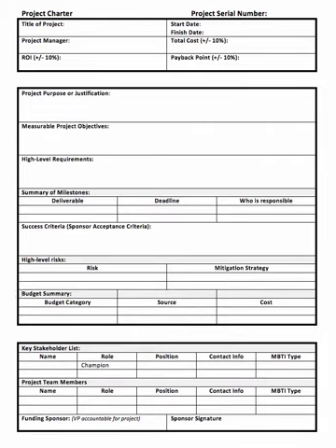In other words, if you're designing a user interface for a program and they say, well, it'd be really neat if we could choose our own colors. Okay, that wasn't in the project charter. So if it's not in the project charter, they need to submit a change request, which is a way that the project charter can be modified legally. So let's go ahead and start with filling in each portion of the project charter.